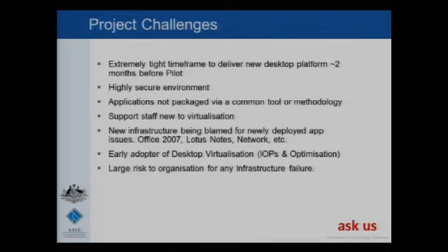We wanted to make this a go, so we had to spend some more money and buy some more spindles. We now manage that issue, and we know what it's about, but it's one of those problems you don't want to have happen when you're about a month away from deploying en masse. So definitely be well aware of the read-write ratio on the SAN. There are many SAN vendor techniques now released that I think help in those areas. 2 years ago, there wasn't much.